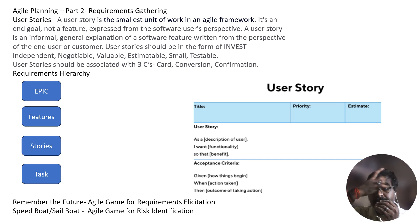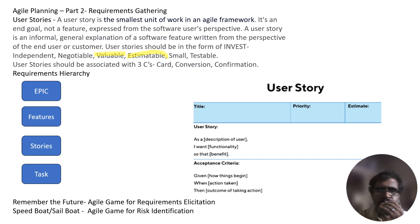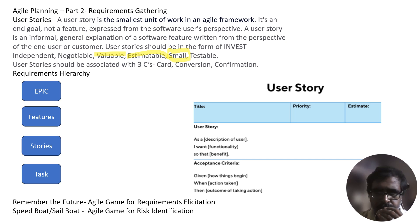Third, user stories should be Valuable — each user story should deliver business benefits. Fourth, user stories should be Estimatable — every story should be clear so that the team can put effort estimates against them. Fifth, user stories should be Small — user stories should represent a small unit of work to make it easier to track. Bigger stories take more time to deliver, and if work is incorrect it could lead to costly rework. A user story should be small enough to fit within one iteration, as work on a user story cannot be spread across iterations. Bigger user stories should be broken down into smaller ones.